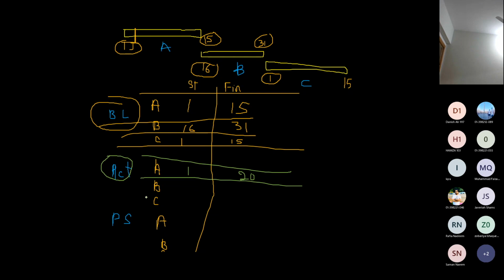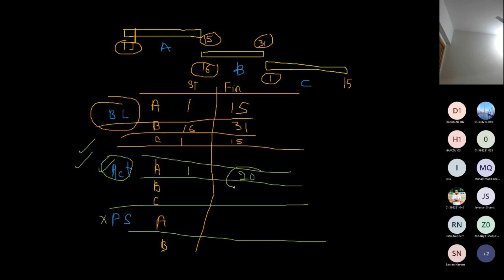So now it will affect the schedule of my project. It will affect the rest of the schedule. The schedule is updated automatically based on actual values. Project schedule is not locked. Because of this delay, the project schedule for the next activity would now start on 21st January and finish on 5th of Feb. So that would move everything. This will push all the activities forward.